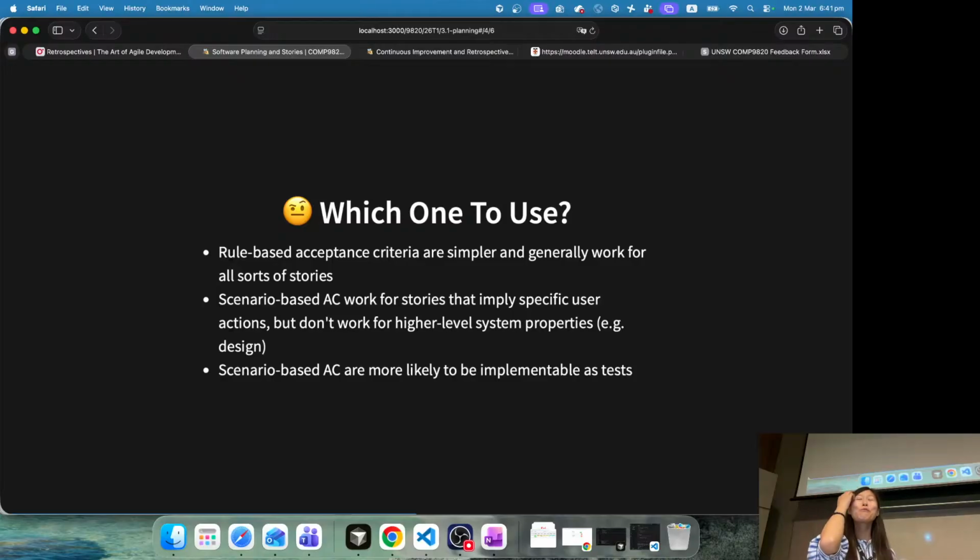Yes, we'll talk a little bit more about the process, like how do we get those stories. But yes, different groups may end up with different clients. And because we only have 10 weeks, we have time limits. So my suggestion is do not make it too complicated at the beginning. You can prioritize only 1 or 2 types of users, and then in the later sprints, you may find, oh, I have more time, I can add more features, I can add more advanced things, and then you can add more types of users and add more features later.